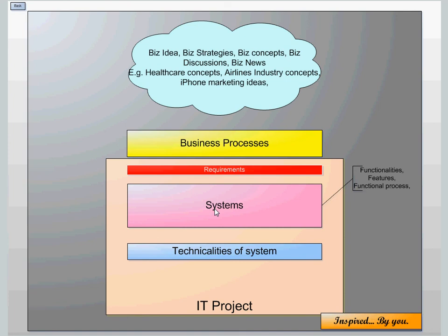You say, well, to develop this feature I would need 20 man hours, 10 man hours to test it, and so on and so forth, and 5 man hours to analyze it. Of course, analysis is not free. Someone has to sit at the desk and send emails around and find out what can be done and what should not be done, and that's how the analysis is complete before it goes to development. So that has to be paid too. There's a cost for that, and the cost is measured in number of man hours.